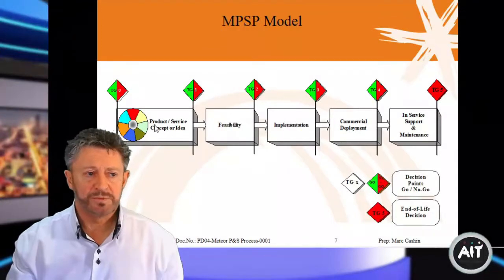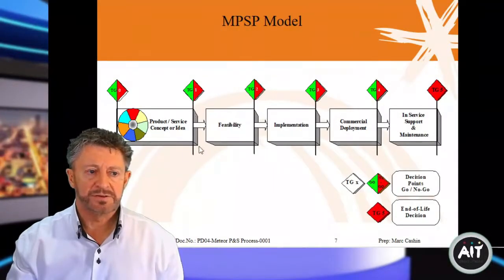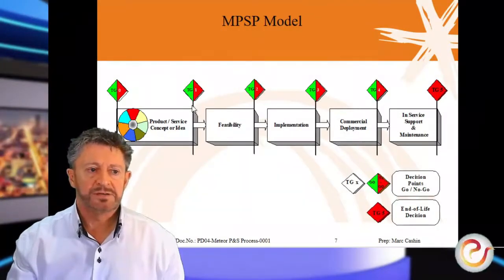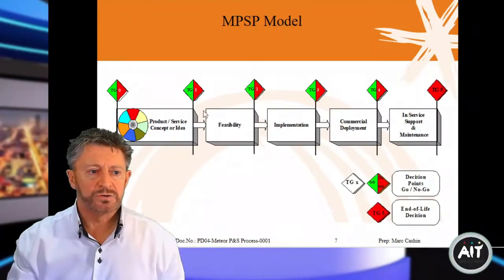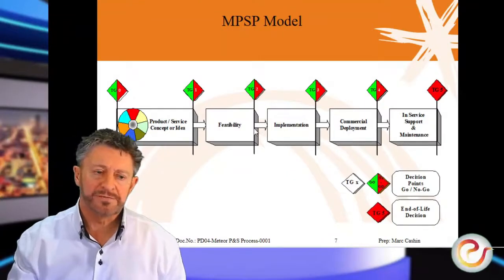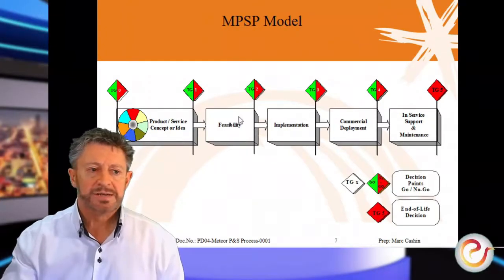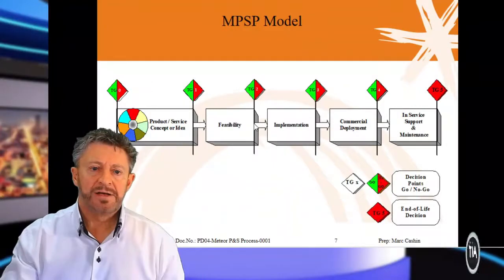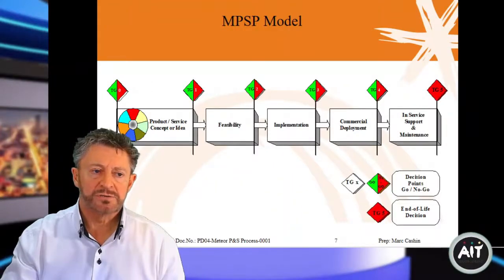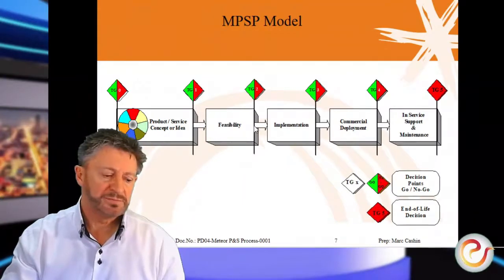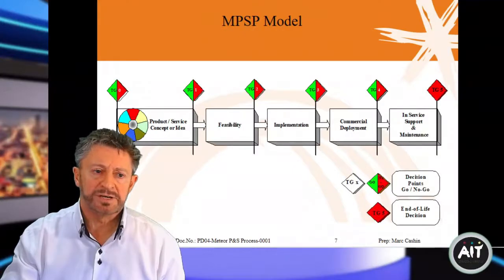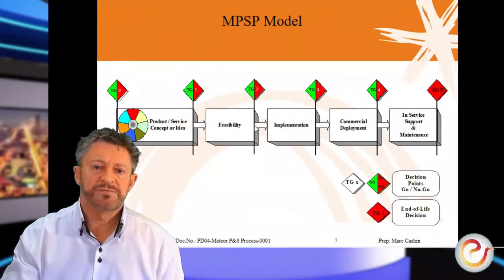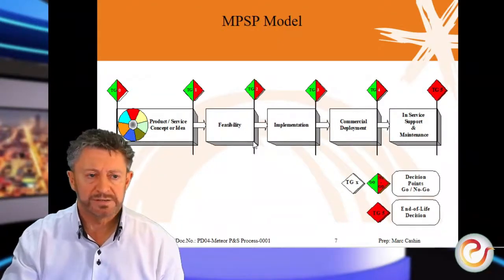So we had decisions. If it fitted the roadmap, we went in and we put together a basic plan and tollgate, and that's as simple as we say here, a decision, go or no go. We could get to the end of feasibility and look at it and say that there is a newer technology coming down the road. We stop the project here because we need to wait maybe 3 months, 6 months, possibly a year, and say, this better or newer technology will make this product far more effective, and we'll wait until then.